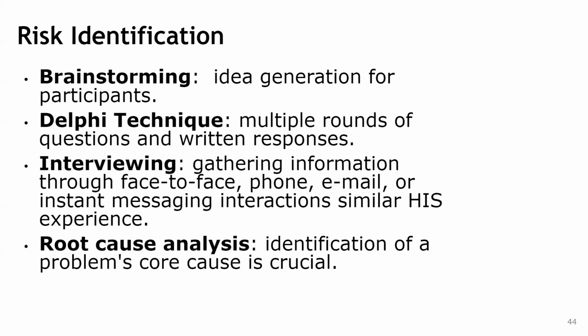You can use risk identification techniques like brainstorming, where you generate ideas, or you can use the Delphi technique, where you ask multiple rounds of questions, and then you get your responses and see different patterns. And also you can do interviews, and also do root cause analysis. These are some of the techniques, but you can use other methods.